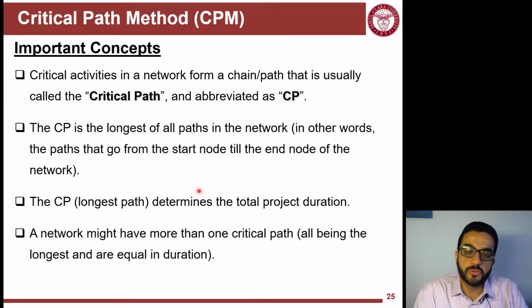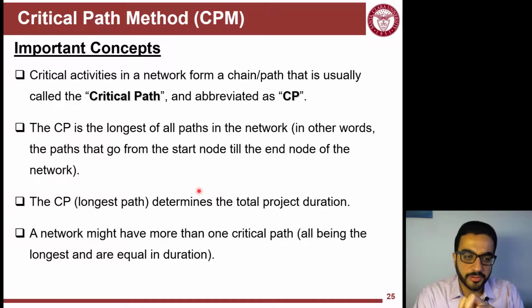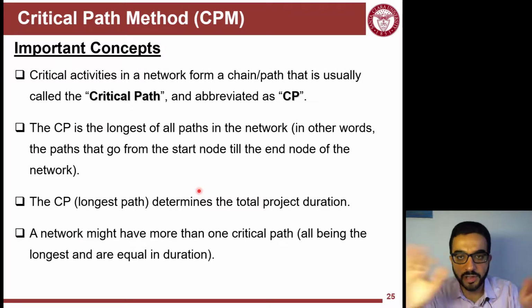One thing to pay attention to is that you might actually have more than one critical path. By luck or by design, you will have a sequence of activities on one path and another chain of activities on another path. So two paths have the same, longest duration. They are both critical in this case, so any delay in one of them will cause delay for the whole project.